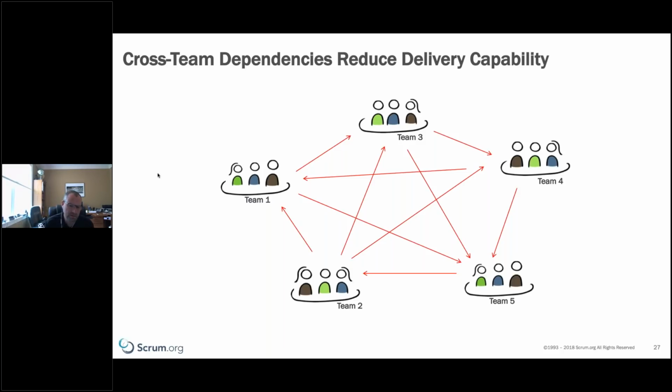But find ways of helping those teams to work together, finding ways of enabling visualization of those dependencies, removing dependencies where we can. Having teams understand those dependencies is critical. One of the organizations that I've worked with, we look at dependency mapping. And we build out from our product backlog as we're working, especially within a sprint, and really looking at generally 3 to 5 sprints or so. We're looking at higher level features and functions, and then we're drilling down as we refine that down, and we're looking at where those dependencies lie.